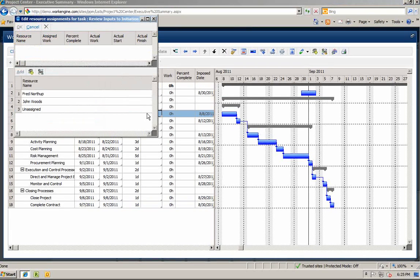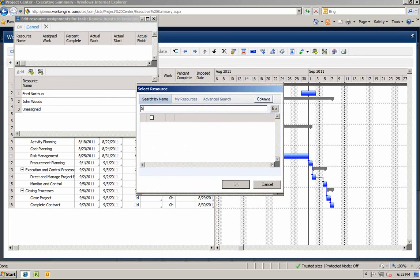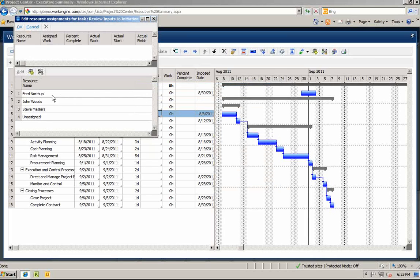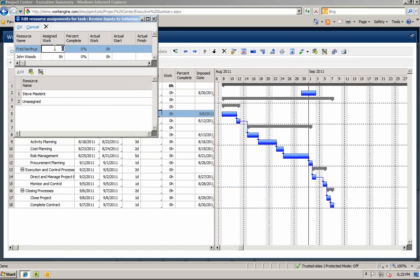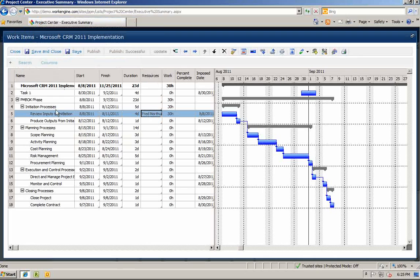Let's add some resources to our work plan. If you have already assigned resources via your resource plan, which we will be demonstrating shortly, you will see them in the resource dialog box. If you want to add other resources to the work plan, you can click Add New Resource and search for other resources. Once your resources are in your plan, you can now assign them to a task.